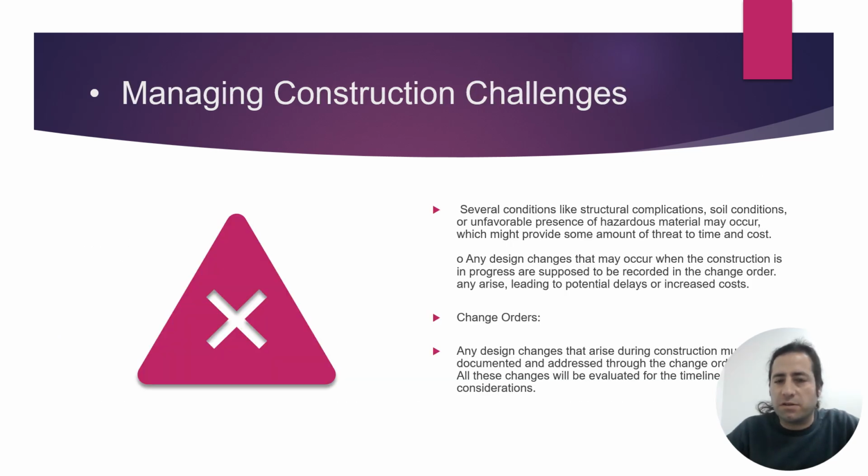Managing construction challenges. Several conditions, like structural complications, soil condition, or the unfavorable presence of hazardous material, may occur, which might pose some threat to time and cost. Any design changes that occur while the construction is in progress are supposed to be recorded in the change order, as they may lead to potential delays or increased cost.